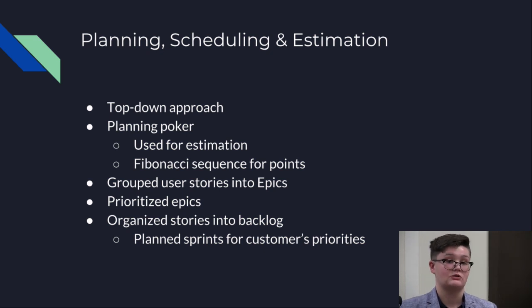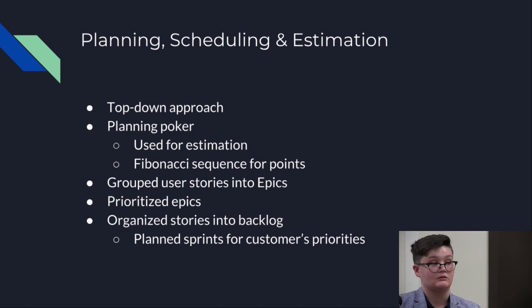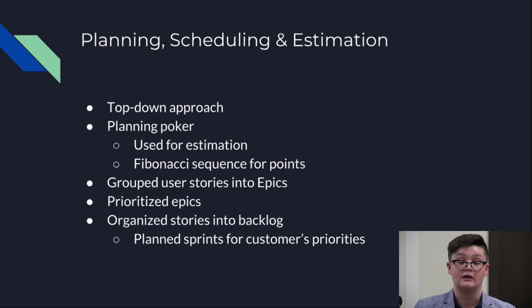Once we had the list of user stories and those were pointed, we grouped them into epics. These epics were largely mapped to the initial features that we identified, so it's a good way to organize the user stories. Then when we looked at the list of epics that we still had left to complete, that was largely the major functionality directly from the requirements. Based on the regular check-ins with our sponsor, we were able to prioritize those epics, checking in regularly during our meetings to make sure that our priorities were still clear, and kept those stories organized into a backlog.